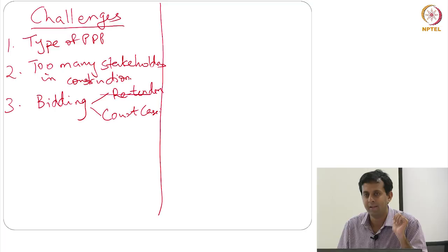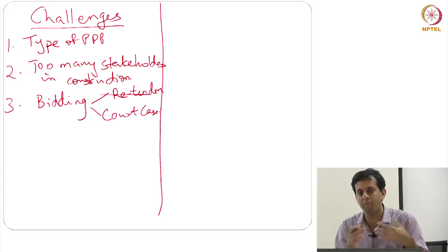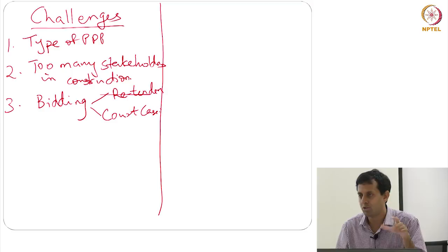As Yamini points out, it could have been avoided if you had possibly staggered the development. Just do one airport at a time, so there is no dispute as to who is winning. As per your criteria, this person has won, let them take it.